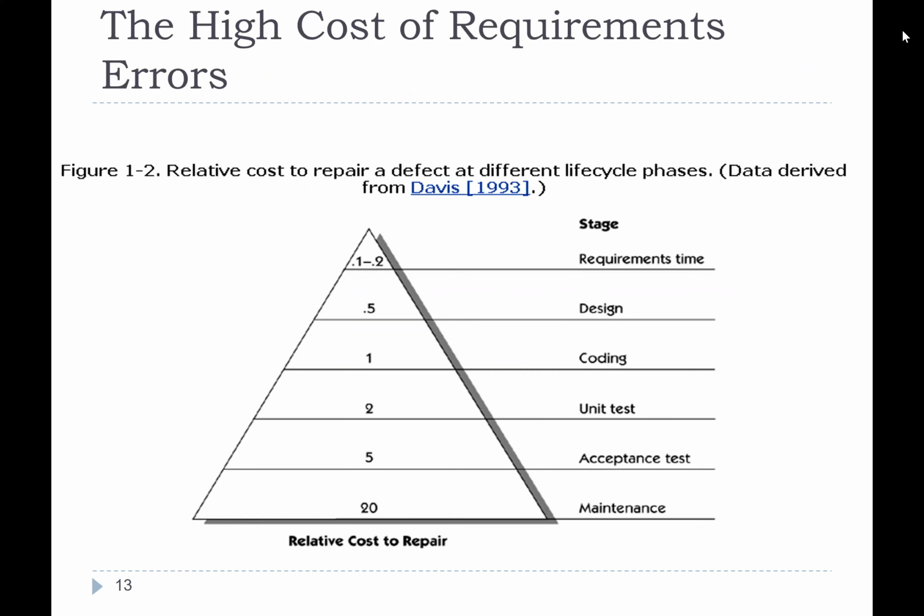Here's another motivation. Getting things right the first time, at the requirements phase, really pays off. If the cost of a bug is worth 1 riyal when you find it at the coding level, and that same issue had leaked in from the requirements, meaning it resulted from getting the wrong requirements, then had you fixed it at the requirement stage, it would have cost 1/10, or even 1/5, of what it costs to fix it at coding.